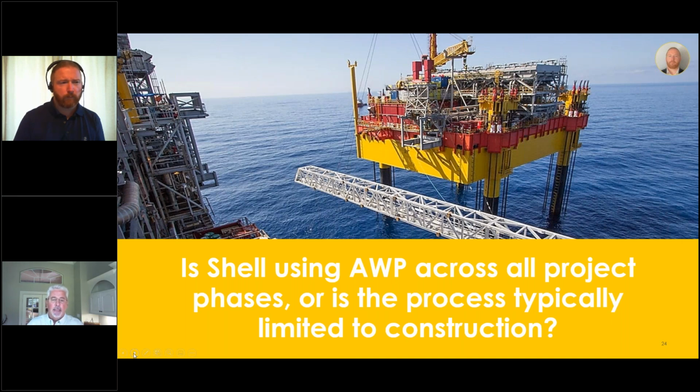The problem with that is it's seen very much as heavily led by construction. So the other folks in the project, the vendors, suppliers, engineering, and procurement don't get on board with the entire process. So it really makes it a little more difficult to implement for the construction staff. And ideally, what pops out real fast when you do this is the fact that you have constraints from not having engineering and procurement involved in the early process, and therefore those quickly come up when you start your IWP development.